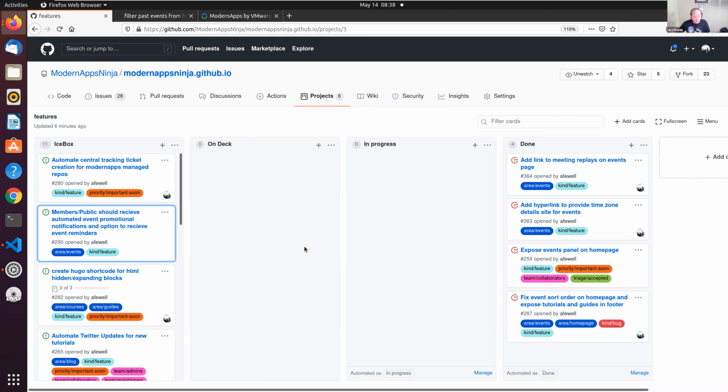So we want to have the system designed in a way that encourages people. If I'm on the vSphere Tanzu 101 course or the 201 course, if I open an issue ticket, it will open on that course. But at the same time, then do something to keep centralized management. And there's a lot of different things we could do for centralized management, but the proposal I have in place is to create a tracking issue ticket, because if we're using GitHub Projects for the project planning, having that centralized monitoring in the format of an issue ticket will allow us to leverage these GitHub Projects features.